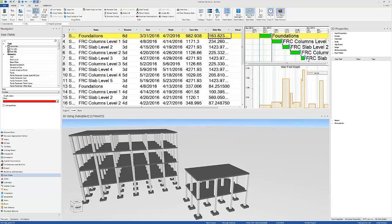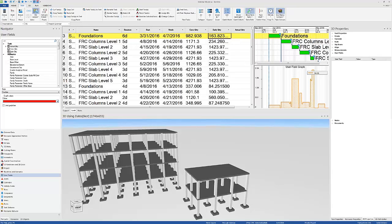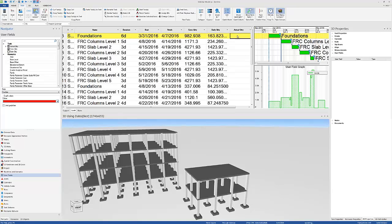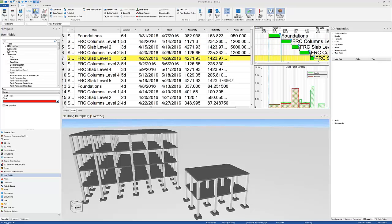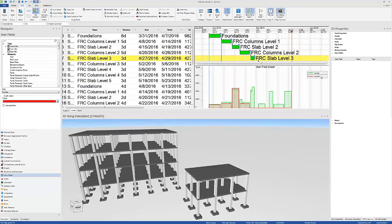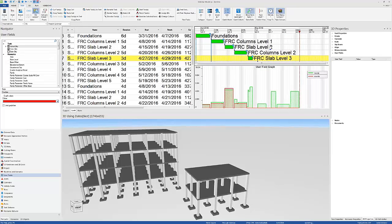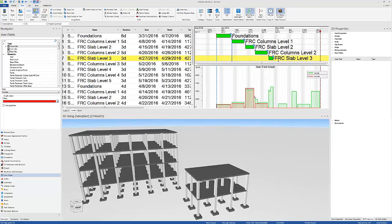And now we can plot actual quantities. You can do actual dailies or actual totals. When it comes to working on site, these quantities are based on the elements from the BIM model, which is not always accurate. So when it comes to project controls, you can start typing in daily, every day, the actual quantities, which could end up being 950, and then 1200, and then 5000, and then 1200. As you're moving through the project, you'll have a plot of actual quantities versus model-based quantities that were brought on site. You can use the green part to predict future quantities and coordinate logistics based on that.